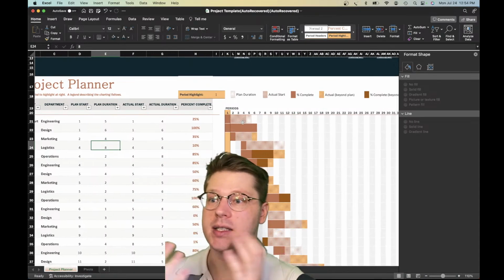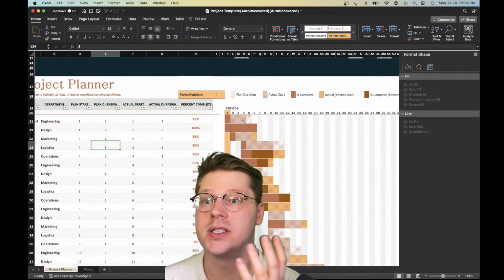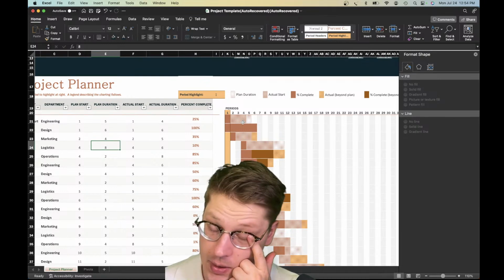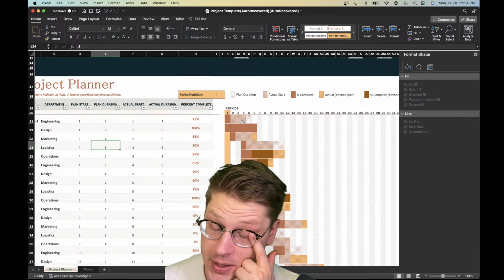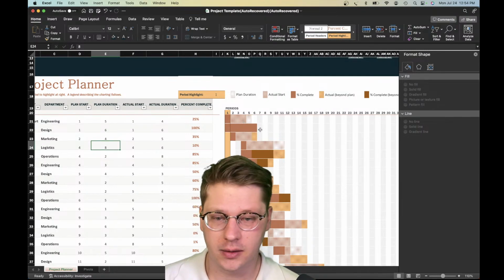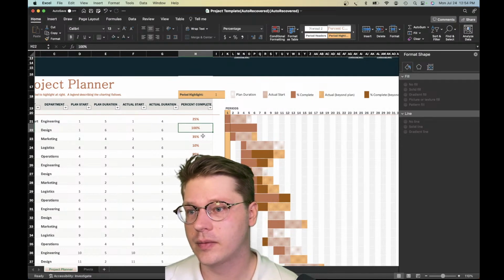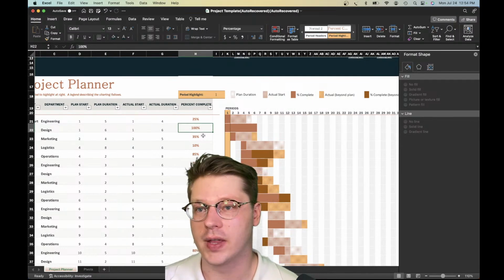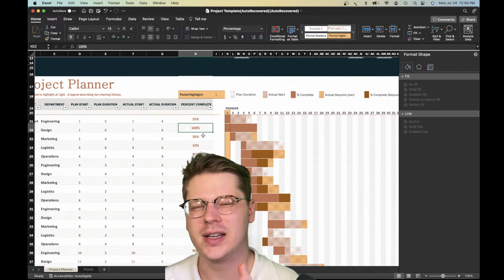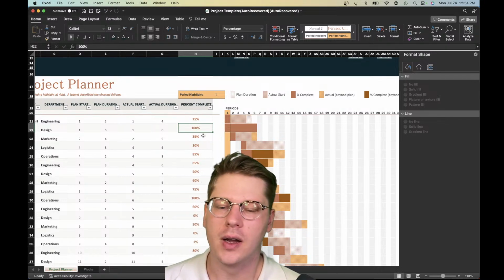Tasks can be different lengths of time, or different sizes. And we have a percentage complete for each of those tasks. If something's a 6-period long task that's 50% done, do we want to account for that, or do we just want to say 50% of any task is the same? There's a conceptual difference there that's kind of important.